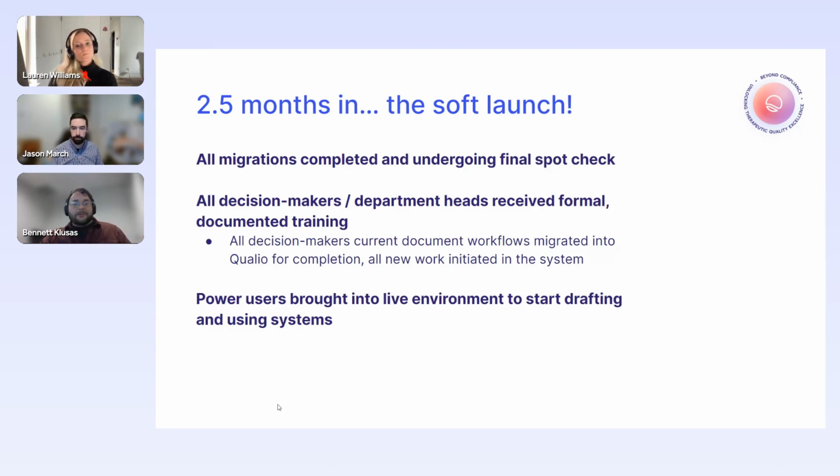Only one person was formally responsible for the go live at our company. This would mean a major bottlenecking of issue resolution. So we had leveraged the organic behavior that people had when they encountered an issue at work, and we let those go to their department heads by training them throughout the past month, so that they could do the organic thing and ask their supervisor first about how to resolve an issue rather than having to lean on a potential bottleneck of one system admin.